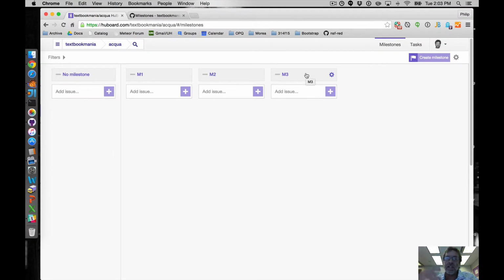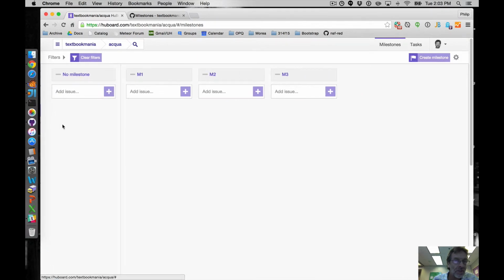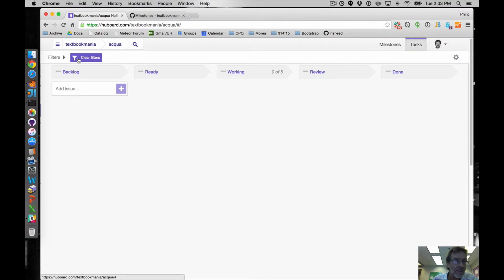But following our issue-driven project management system, we're really going to focus just on one milestone, the immediate tasks that we need to work on. We're not going to try to look too far ahead in the future. So what would be nice would be to restrict our view to just a single milestone. We can do that by clicking on this filters thing, and we can set up a filter where we're only interested in milestone 1 stuff. Okay? So if we do that, we can now go over to tasks, and you can see we've got some filters established. So you can click over here and you see milestone 1 is still set up.